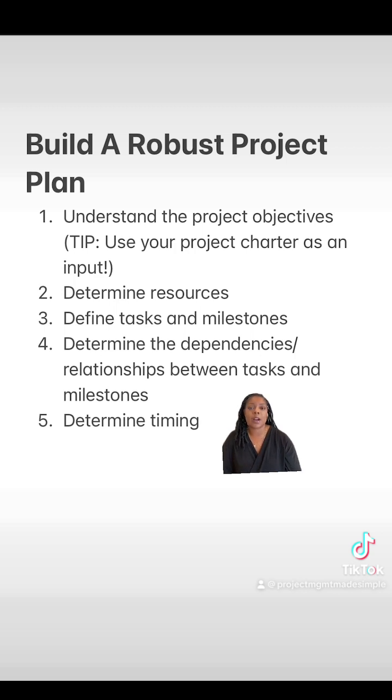And so from there, working with the software engineers to understand how long it will take to actually complete those features. And as a part of that conversation, lining up the dependencies between the various tasks, if there is any. There's oftentimes some things that need to finish before another task can start. So making sure to have that outlined as a part of the project plan as well.